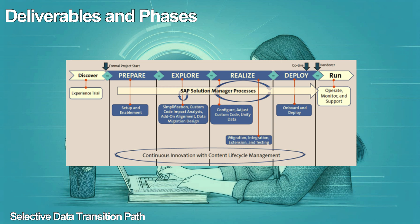In the realize phase, the team completes the implementation, tests the converted solution and data migration in the quality assurance (QA) environment, migrates the selective data, and creates the new production environment. Finally, in the deploy phase, the team rehearses the production conversion and carries out the production conversion, data migration, go-live, and hypercare. At the end of the deploy phase, the build team hands over the solution to the operate team to commence the run phase of the project.